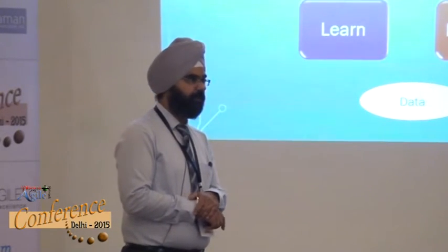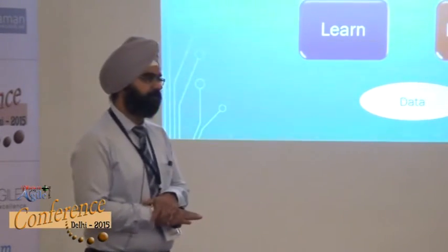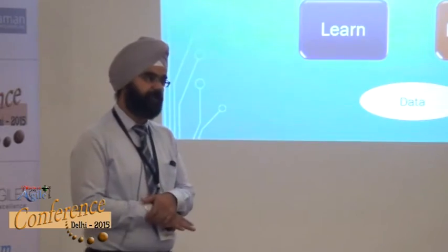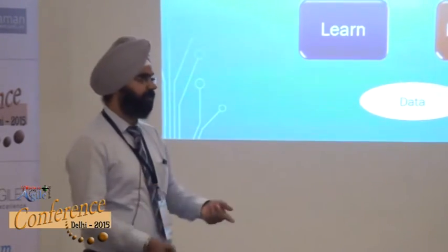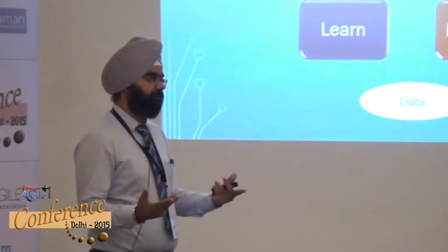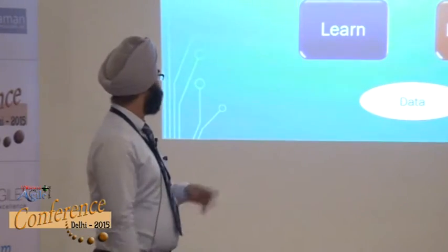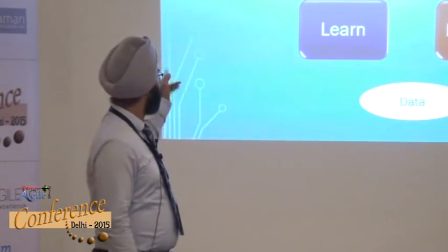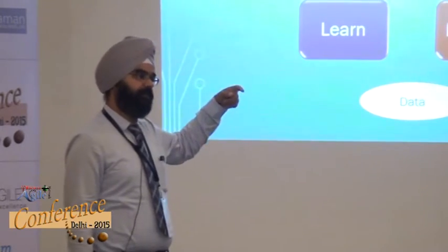Yes, demo. And there is another ceremony that we do, the retrospective. So when we say measure, we are doing the demo, getting the customer feedback, and at the same time we are retrospecting, just to check what went well, what went wrong, and what we should do going forward. So that is the learning phase. When we learn, we get a new idea and then we go into the cycle.